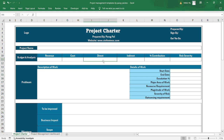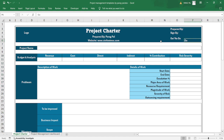The project charter should capture the project name, revenue, direct and indirect costs, and the contribution margin, along with risk. Based on these financial figures, the project manager's team can identify whether to go forward with the project or not — marking it 'go' or 'no go.' If the project adds value to the business, the company will proceed; otherwise they should consult the charter before deciding.